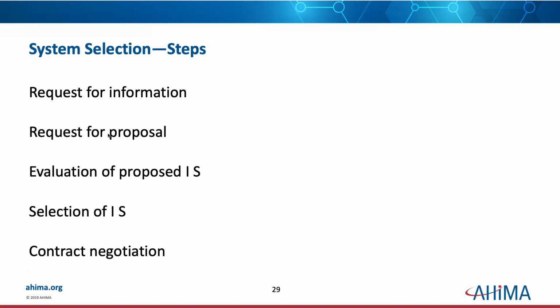And once you receive that request for proposal, then you go through it to identify which vendors truly can meet all of your criteria, or enough of your criteria that you will evaluate their product and bring them in to do some vendor displays and presentations. And then you do that evaluation. I mean, you've evaluated the proposal, but then you bring in the vendors, you bring in the systems, and you actually look at what could this do and what could be met, what wouldn't be met, what really would it involve, and all of that.